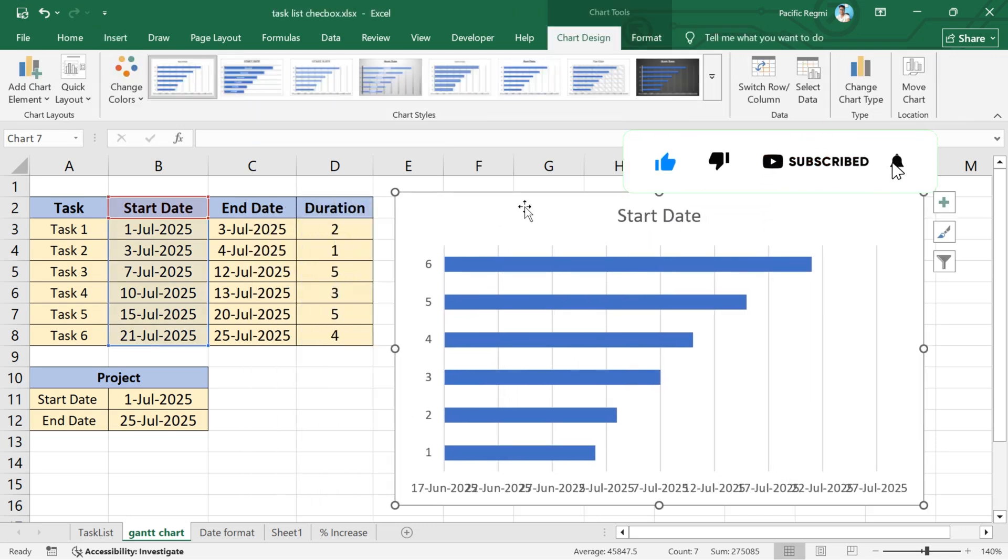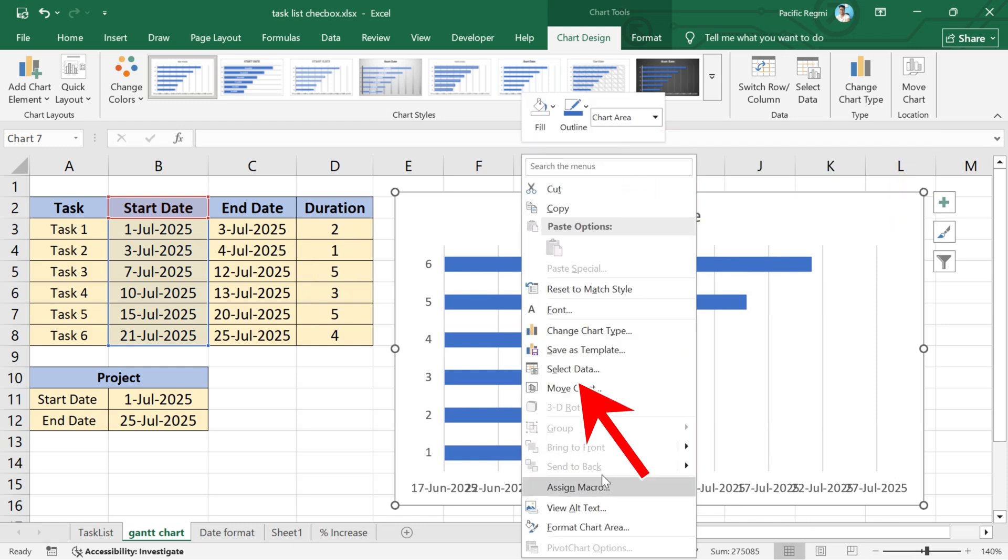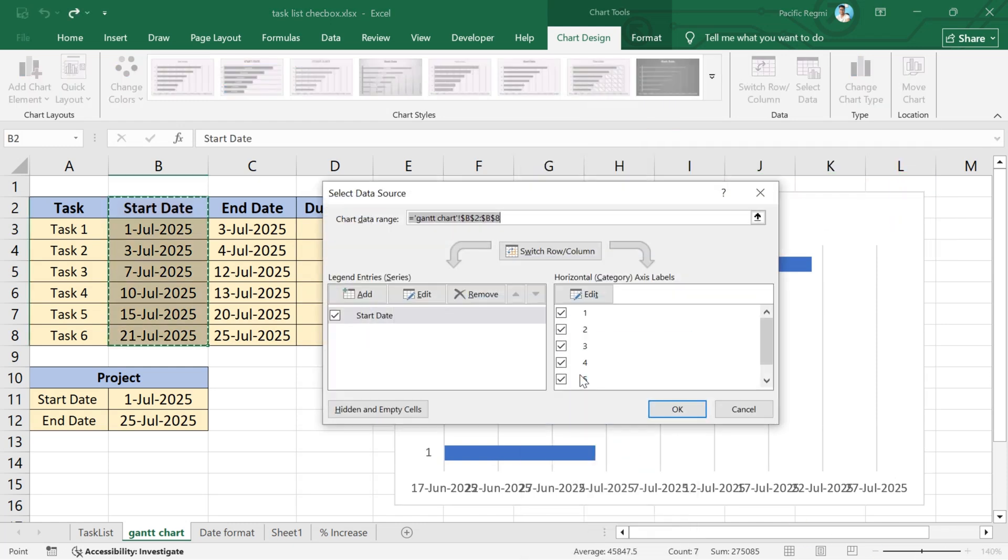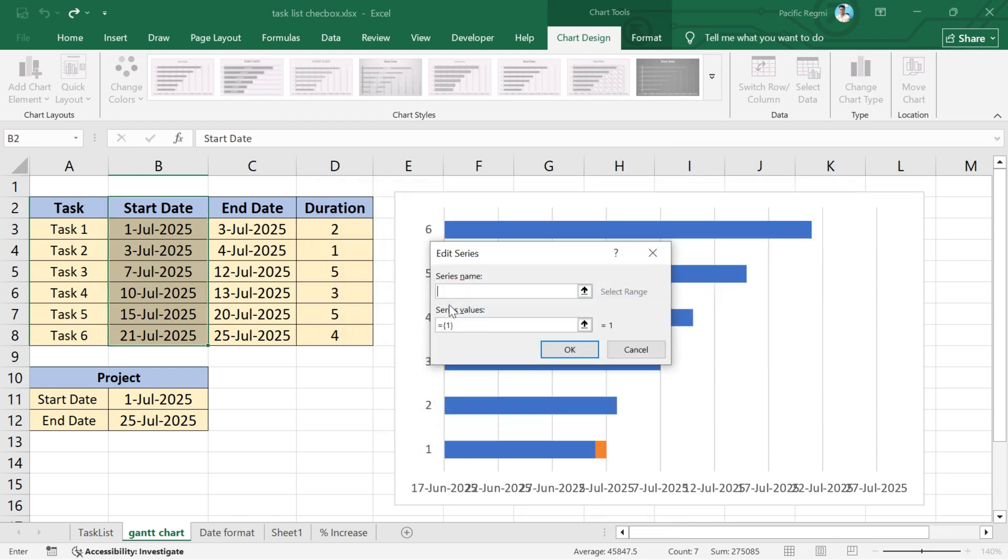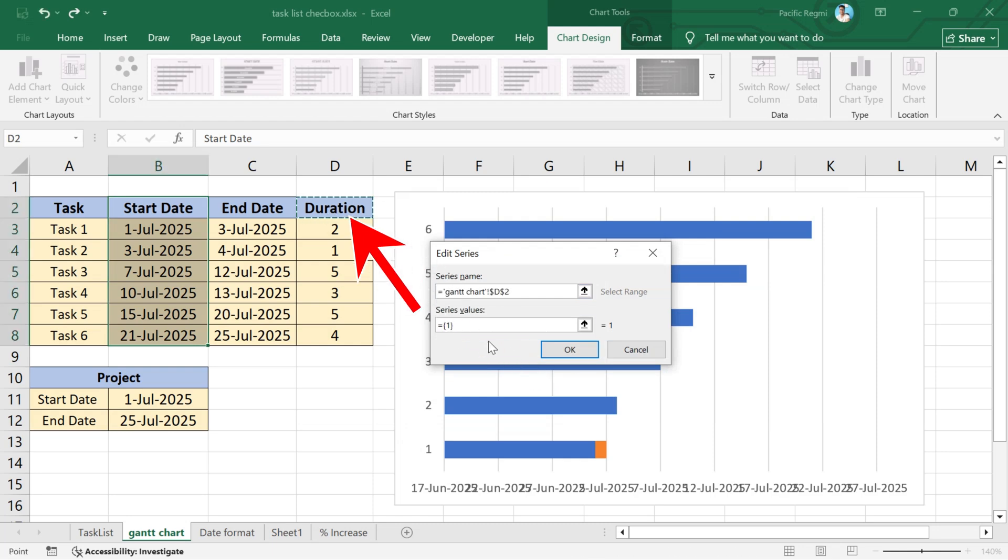Now, right-click on the chart and choose select data from the pop-up menu. In the pop-up that appears, click on add under legend entries. Now, in the series name, select duration.